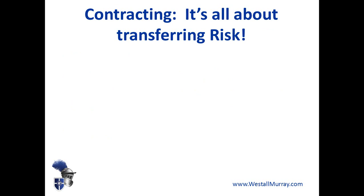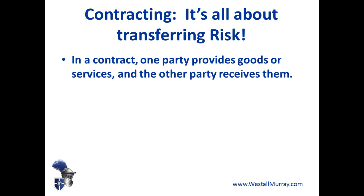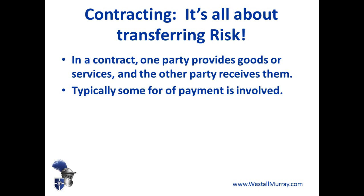The point about contracting or putting in place contracts is that you are transferring risk. Risk is being transferred or redistributed between a buyer and a seller. Remember, of course, the contract is a legally binding agreement between two parties. One party is providing goods or services and the other party is receiving them and typically paying — either monetarily or possibly with some other reciprocal services or payment in kind.